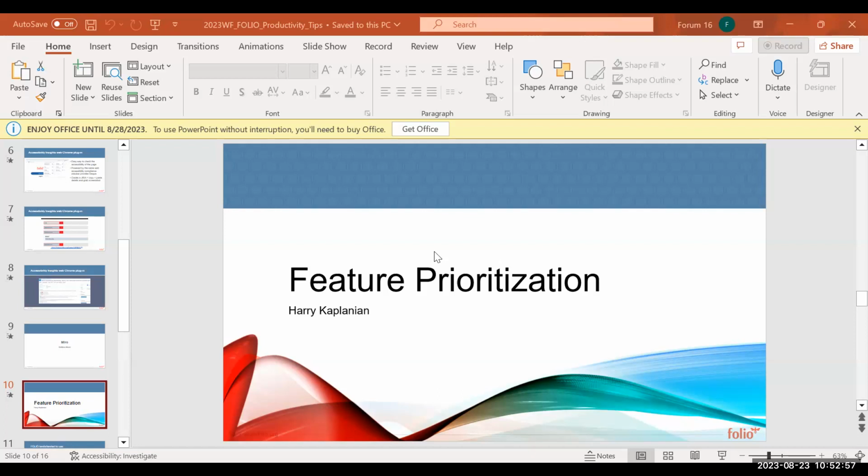And when we're looking at it from the product owner perspective, oftentimes there's just plain dependencies. So in a sense, there's a priority that's dictated to us because we don't really have a choice. You've got to get piece A done before you can start piece B, and there's no way to do it any other way, right?